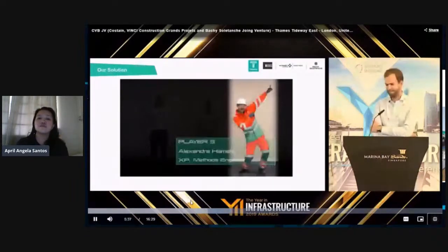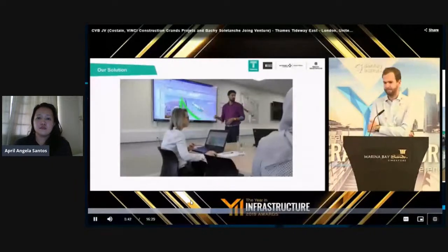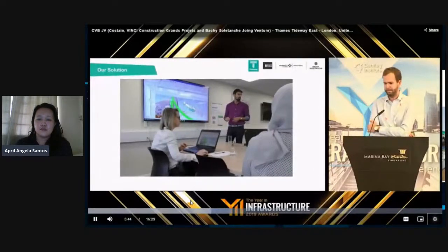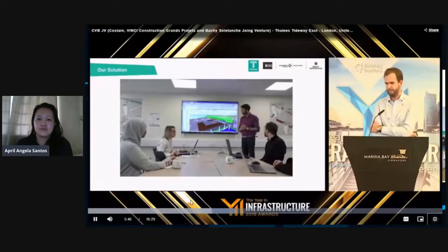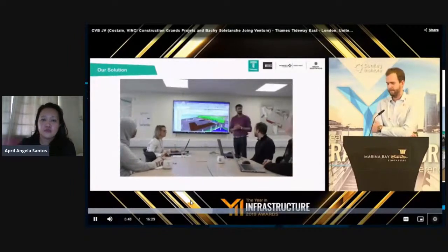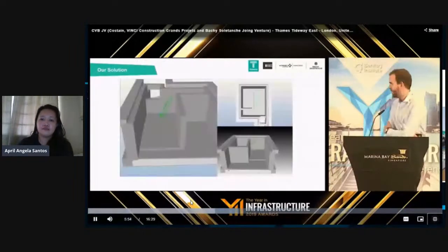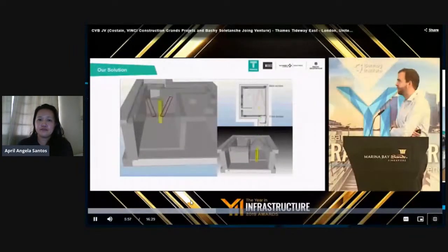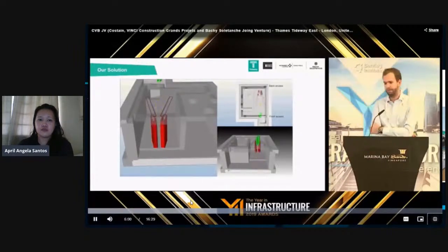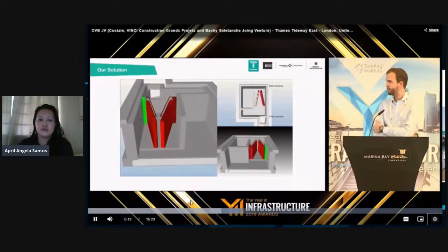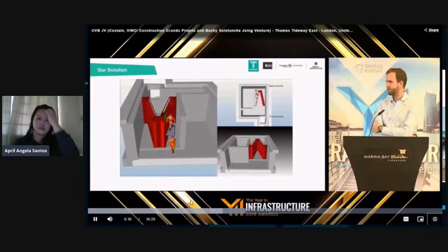Here on Tideway, we embrace the use of technology as we aim to eliminate the risk of harm. Implementing 4D modeling with our methods engineering team early on in the project has helped identify, mitigate, and manage unforeseen risks. Different solutions were analysed in the Chambers Wharf ventilation chamber to tackle the poor access, egress, and limited available space for changing the carbon filters. This approach helped us early on to design the components to fit the construction sequence and allow the safest method of work for these confined spaces for the future operation of the Thames Tideway Tunnel.